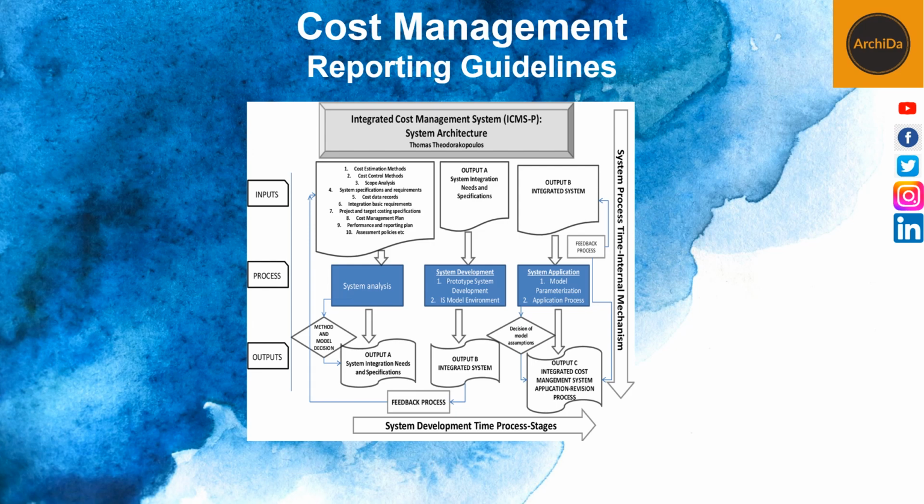Reporting guidelines. You need to have a format and communication channels to report your findings as you monitor the project's progress and present this data to your stakeholders. They must be included in the plan. How frequent will you be reporting about cost performance of the project? What will be the format for cost reporting? For instance, you will report a brief high-level cost report to senior management every 2 weeks and a detailed report every month. This must be cleared out.